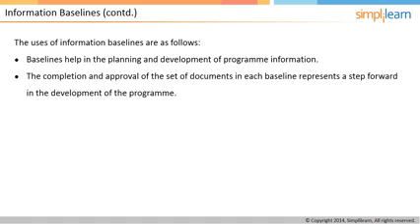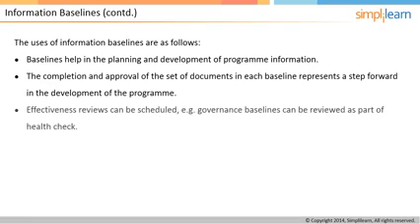All the documents are created for different purposes and are updated at different stages of the program. As and when we complete and implement these documents post-approval, we move ahead in the program. Governance baselines need to be reviewed frequently to ascertain their effectiveness. So, it is an accepted practice to include the review of these documents as a part of regular health checks.